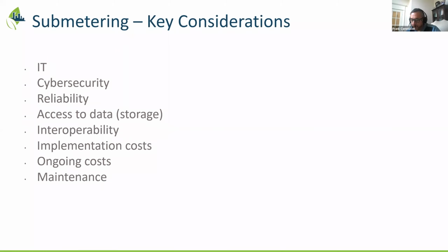Okay, that's very helpful. I would concur with you that with the slightly additional cost of something temporary going permanent, it's been our experience that things just go awry right afterwards. So I think the economics could be shown fairly easily to justify that permanent installation. It might be a 25 or 30% adder to go with a permanent solution as opposed to one that's there for a month. So I would recommend a permanent one.